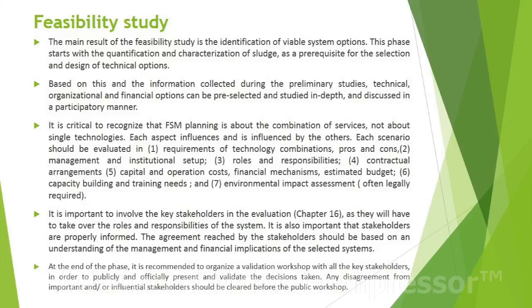Each scenario should be evaluated in terms of technological combinations, pros and cons, management and institutional setup, roles and responsibilities, contractual arrangements, capital and operation cost, financial mechanism, estimated budget, capacity building and training needs, and environmental impact assessment, often legally required. It is important to involve the key stakeholders in the evaluation, as they will have to take over the roles and responsibilities of the system.